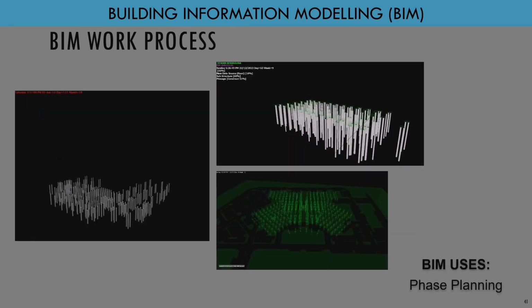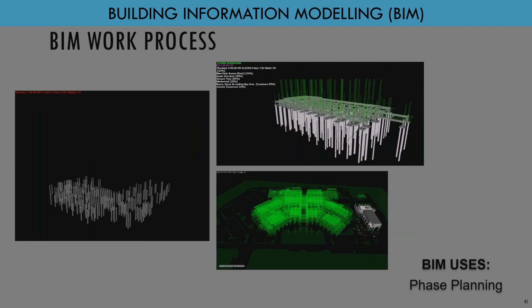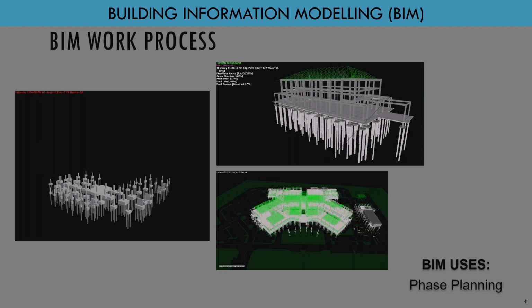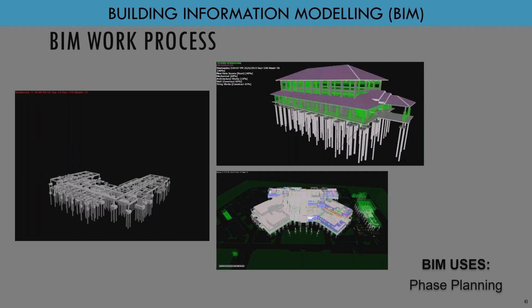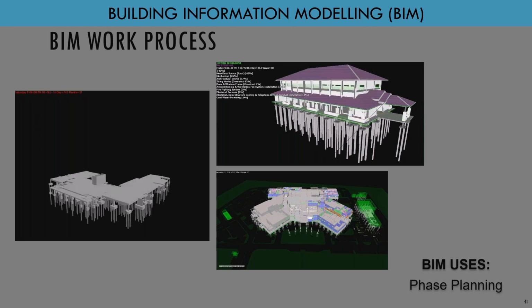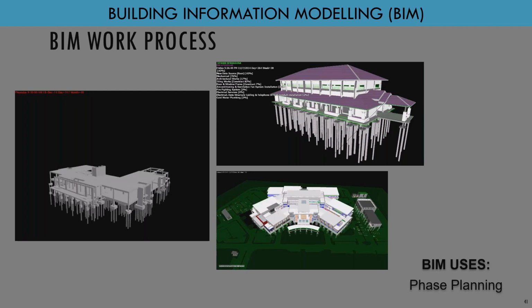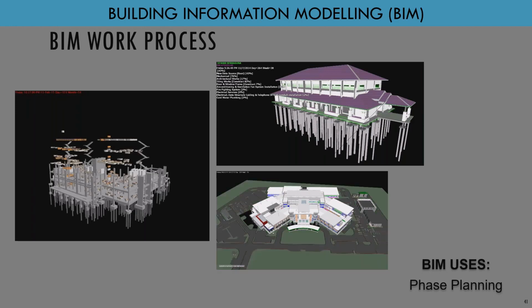When we move to the construction phase, the contractor will get the model. The contractor will propose the scheduling, the CPM, and we can combine it with the model. We call it a 4D simulation. This one we call 4D. If we put a cost inside the model, we call it 5D. The SO, the PD, can verify the construction. You can see this one.